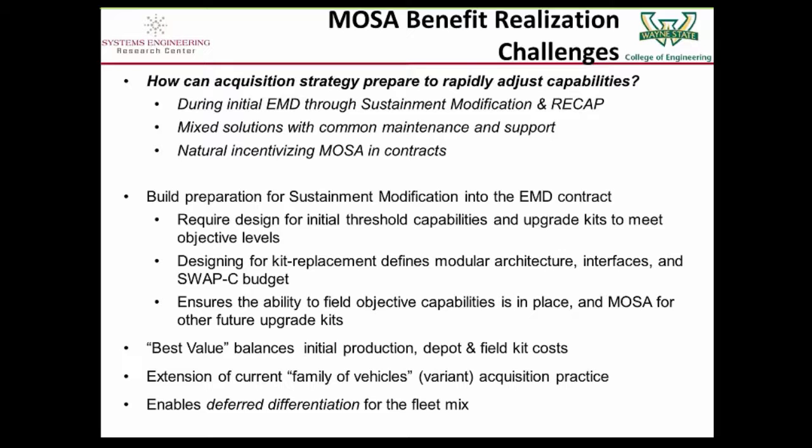I want to just throw in a nice keyword from the bottom line there, which is that when we have a modular structure, when things can be added at the end or swapped out at the end, we get an opportunity for what's called delayed differentiation. That is, we proceed with constructing 95% of the vehicle or 90% of that system, and then when we're going to put it in the field, we finish it with the last 5 or 10% of add-ons that are needed for the mission that we're sending it out to.